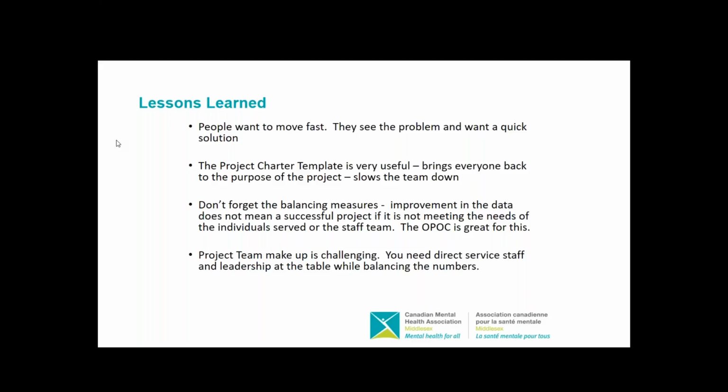So they all need to be at the table. That said, too large a group can really delay the process because you get so many ideas and it can become overwhelming. But too small isn't going to give you enough input. So that was demonstrated when two of us worked on the fishbone versus our project group, and they came up with some better ideas and additional ideas.